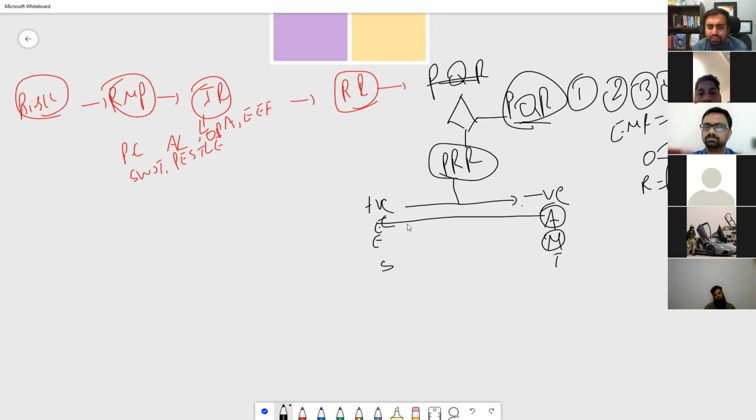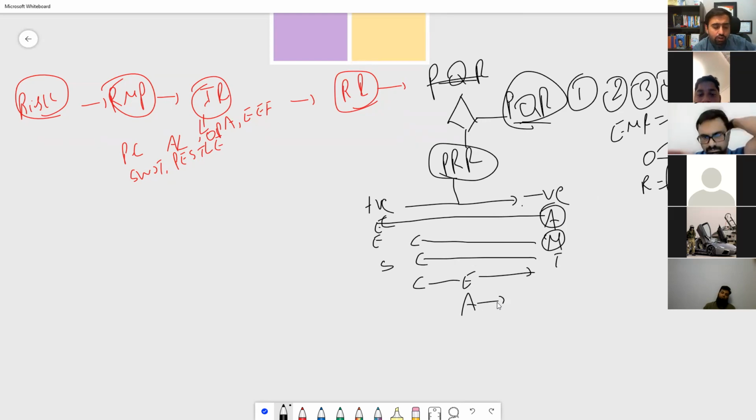Exploit is the reverse of avoid. You increase probability and impact, both things, to make sure it happens. Mitigate, reverse is enhance. You increase one thing, probability or impact. And if you have a big opportunity, you share it with others. You can escalate any risk to the management, that is used for both negative and positive risk. Then there's acceptance. Acceptance of risk is also used for negative as well as positive risk.